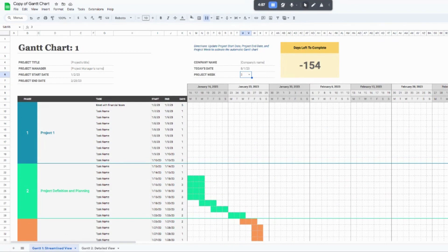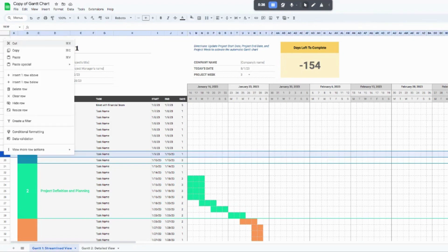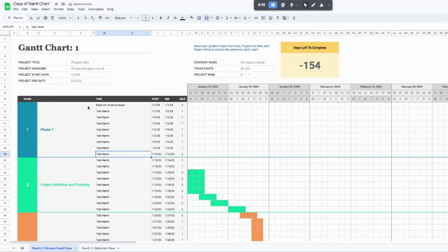A question I get quite a bit is: what do I do if I want to delete a couple of tasks? If you don't have all of the tasks for a phase, what I'd recommend is deleting a row. Click on the row above the last row in the project phase — in this case row 19 — right-click, and click 'Delete row.' You don't want to delete the last row or the first row; delete what's in between, and that won't jeopardize any of the formulas running behind the scenes.